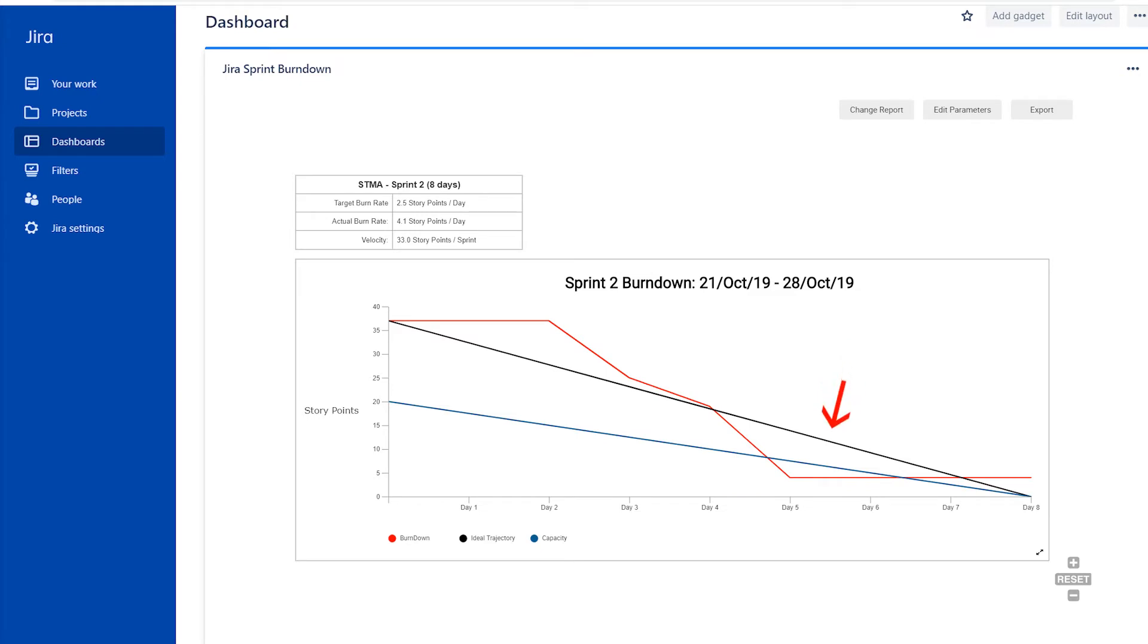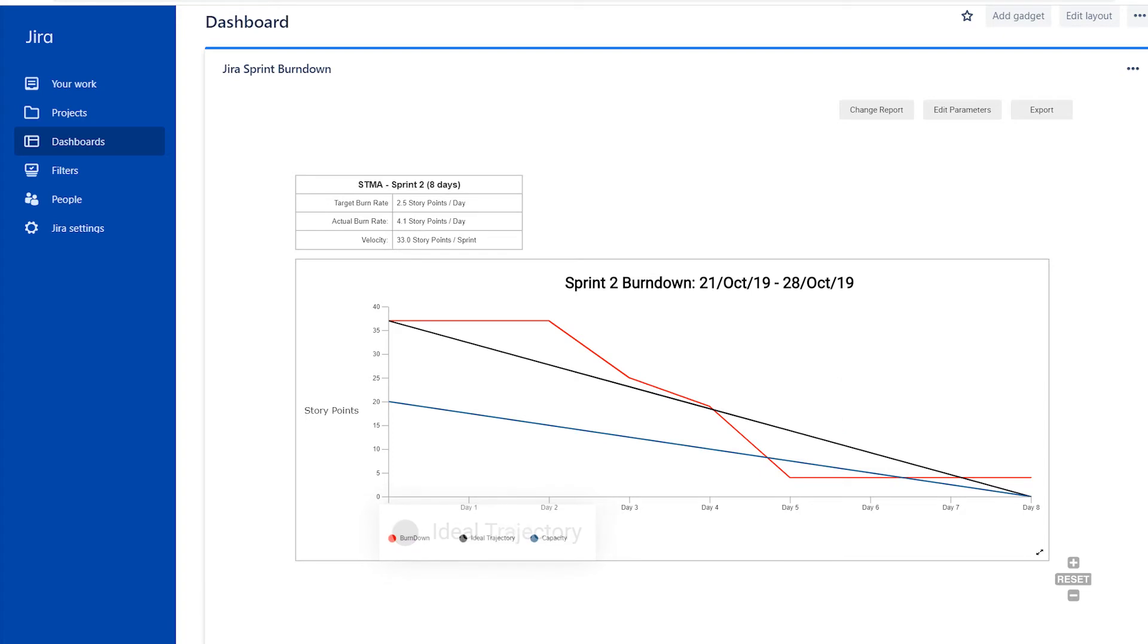The black line sloping from left to right represents your ideal trajectory for progress. Your team's capacity will be represented by a blue line.